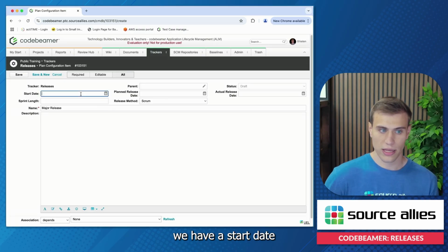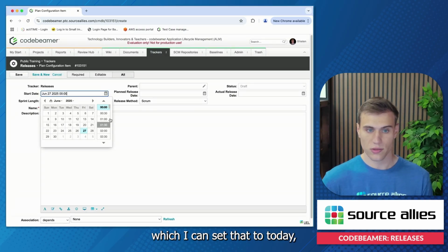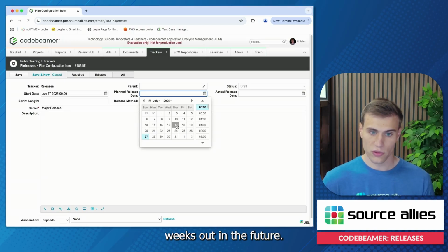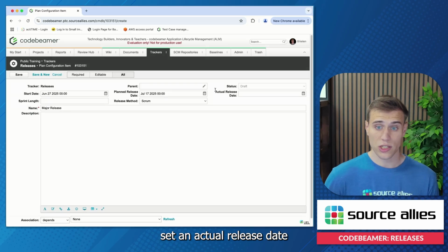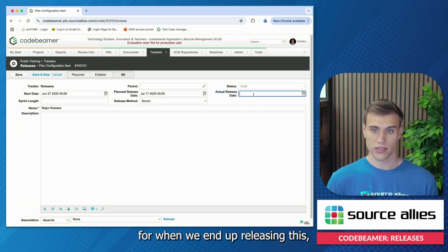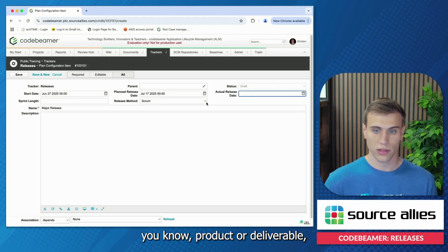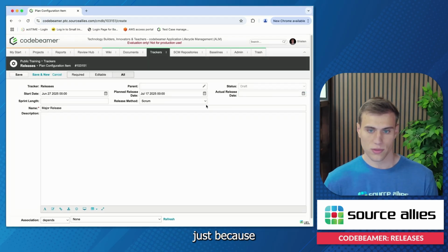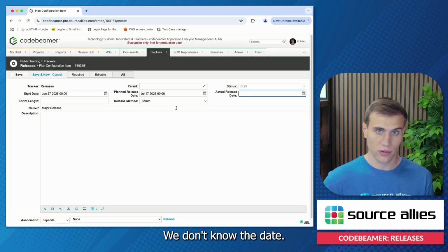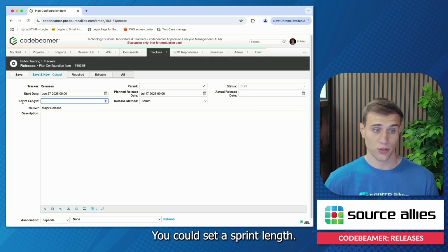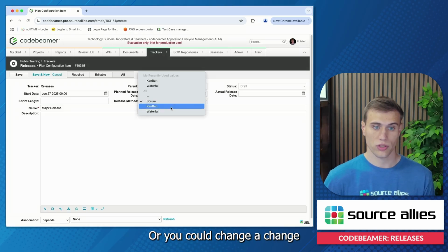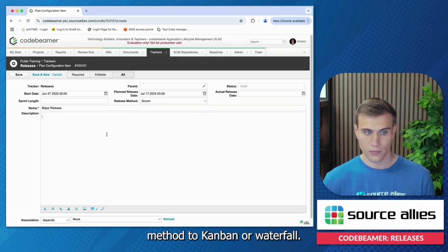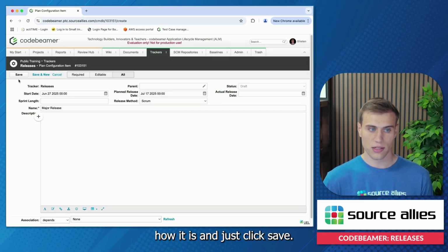Here you can see that we have start date, which I can set to today, a planned release date, which I'll set just a few weeks out in the future, and we could set an actual release date for when we end up releasing this product or deliverable, whatever it may be. I'm not going to set that yet just because it's not actually being released yet. We don't know the date. You could set a sprint length, or you could change the release method to Kanban or waterfall. I'm going to leave all of this how it is and just click save.